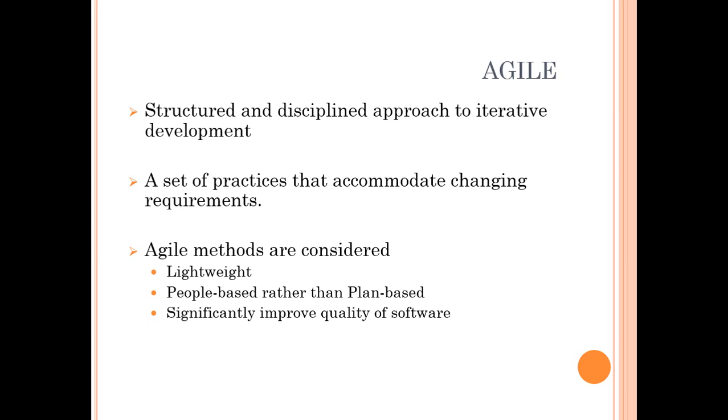That means team size can be from 5 to 9, but not more than 9. That's what standard convention says, because it's very easy to communicate with all team members. Number of communication channels would be less if we have limited team members. It would be very good visibility for all team members across the development for the 2 weeks iteration or 3